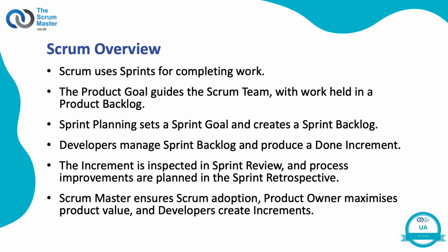At the end of the sprint, the increment is inspected by the Scrum team and stakeholders at a sprint review. Adaptations to the product backlog often result in more being known about the product and the domain within which the team operates. Incorporating these adaptations into the product backlog will help to deliver a more valuable product.